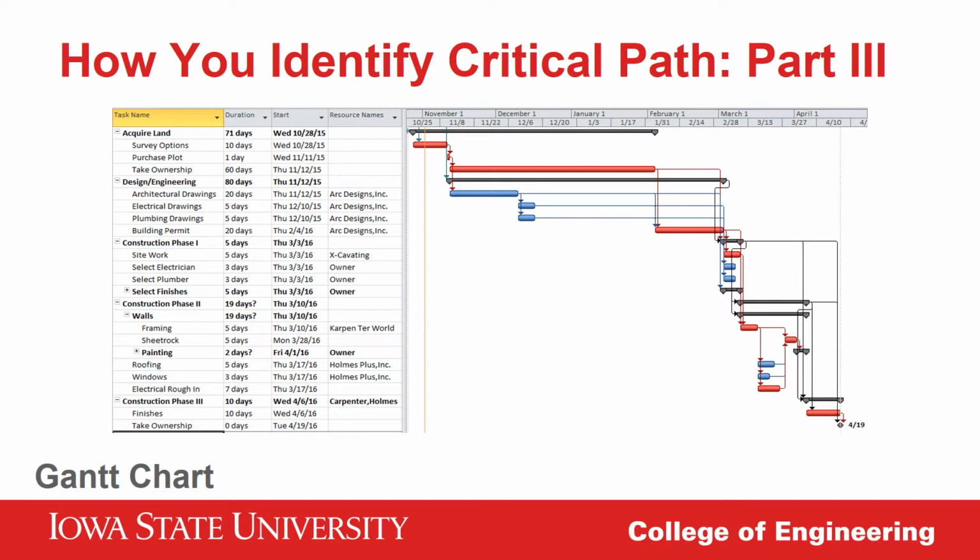Another advantage of this style schedule is the entire project overlays nicely onto a cohesive timeline, which you can see on the top row of this graph. In my experience, this helps non-engineering managers understand the larger picture of the project that may be critical to the rest of the organization, say when assets can be depreciated. Also, each activity is represented by its own bar and links to dependents with arrows, which makes the identification of activities with lots of slack, or activities that are completed before absolutely necessary, easy to identify.